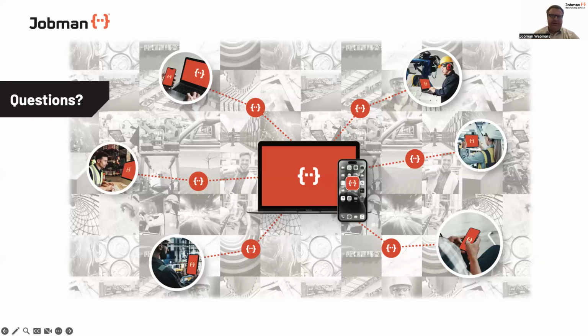But the advantage of doing it that way, even though it's maybe one or two extra steps, is it now will impact your job cost reporting, which is the important part of this. It's not just, hey, someone's stuffed up. It's, hey, someone's stuffed up or something's stuffed up, and we now have an impact on our profitability. So the great thing about Jobman's process is by creating that work order from that job alert, we can now pull that information into the parent for the reporting.